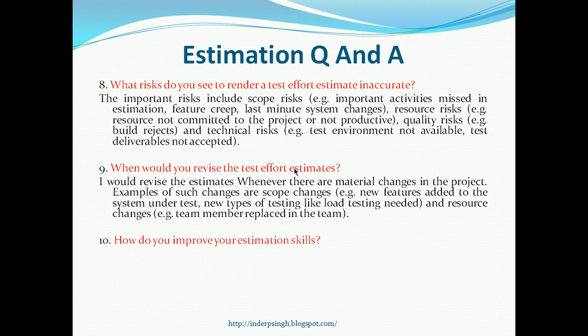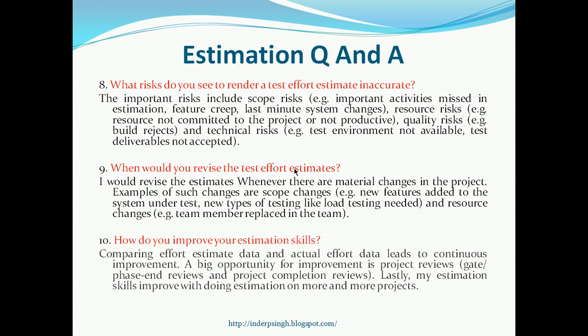Next is, how do you improve your estimation skills? So the way to improve your estimation skills is first of all to brainstorm and come up with each and every activity that will be required to be performed, and also keep track of the actual effort data, because that is what will show you what really happens in practice. And when you compare your initial effort estimate with the actual data, that is actual effort being put in by the team members, that is when you will know what the surprises are and how to refine your future estimates.